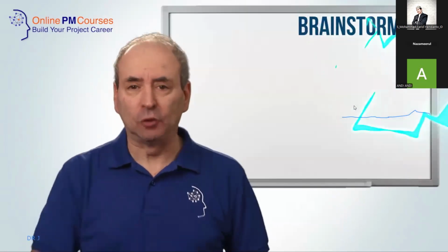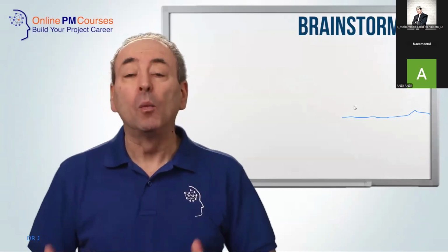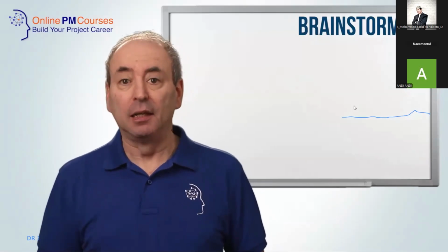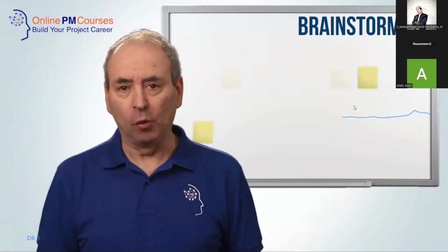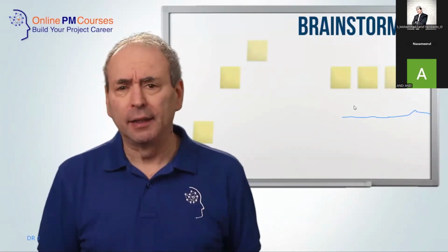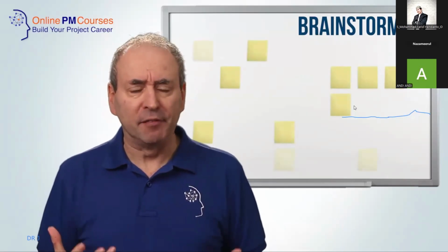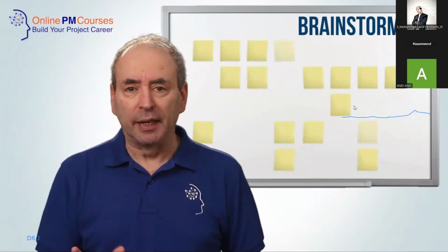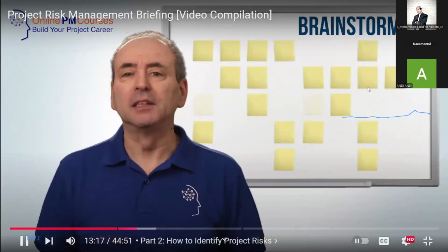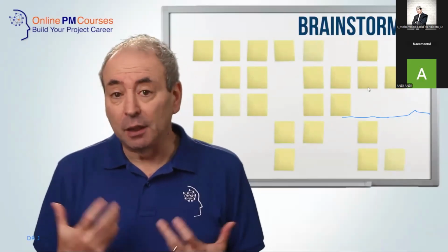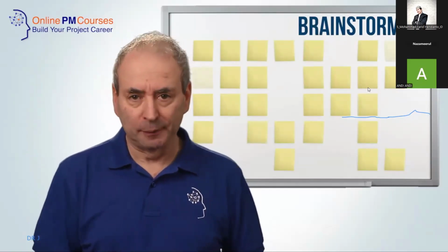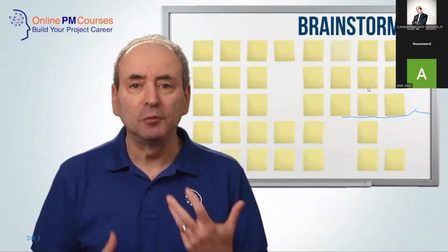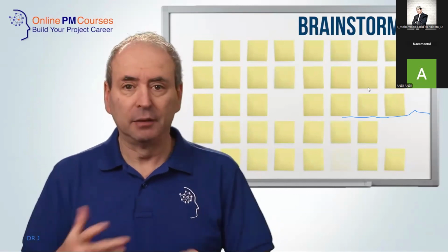Let's start with brainstorming. In brainstorming, we invite the whole team to contribute ideas without limitation, and we get them onto a board. To do this right, we probably need to be very clear about what it is we want, and we also need to be clear that there is initially to be no discussion of the ideas. If someone's had an idea, we record it. And then once we've recorded all the ideas, we can start to sift them, sort them, organise them, and then evaluate them.